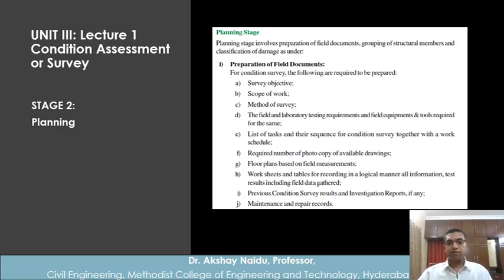Survey objective, very important. We have to write what is the objective. So and so building located at so and so address, and the objective is to assess its structural condition. Depending on the complaint, it can be very specific. If it's not a full thorough investigation, it can be just a partial investigation. So the survey objective has to be identified, and the scope of the survey has to be clearly mentioned.